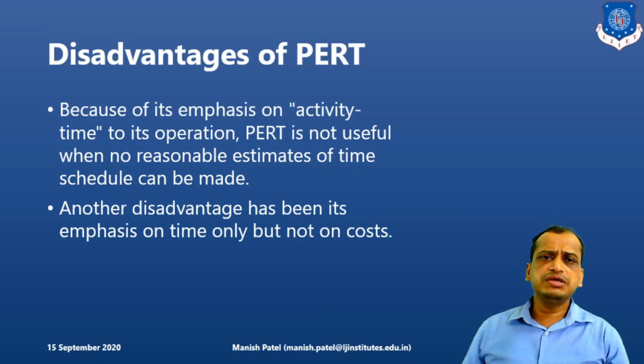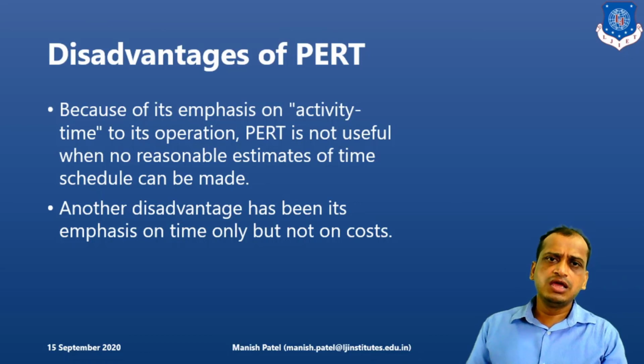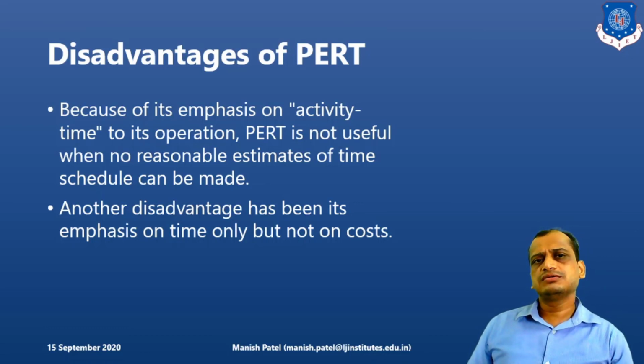Again, it is purely based on time estimates, probabilistic time. So if you have failed to get proper estimates of time for the activities, it is difficult to get an accurate picture of the project duration. As a consequence, it is very difficult to decide when the project is going to be completed. So here are the pros and cons of PERT, right?